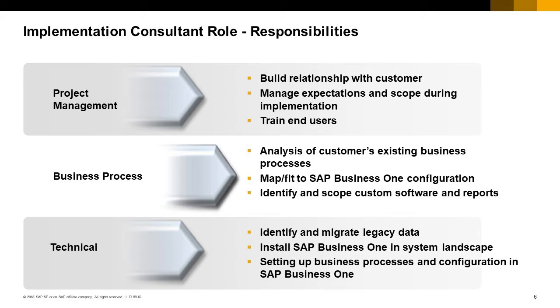What do you consider is the most difficult part of the implementation consultant job? Existing partners tell us that the most difficult tasks in the implementation are concerned with analyzing the customer's business processes and mapping them to an SAP Business One configuration. Partners also find that data migration is often a difficult task, since a knowledge of the database tables is required and often the customer's data does not map easily to SAP Business One. Data migration often takes longer than expected.